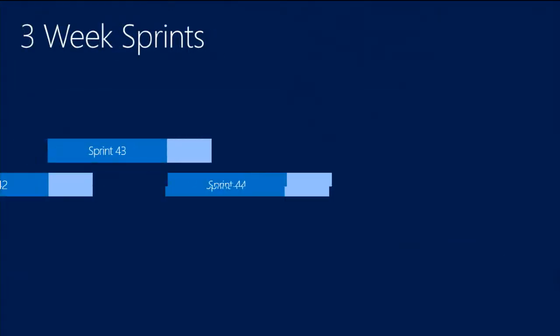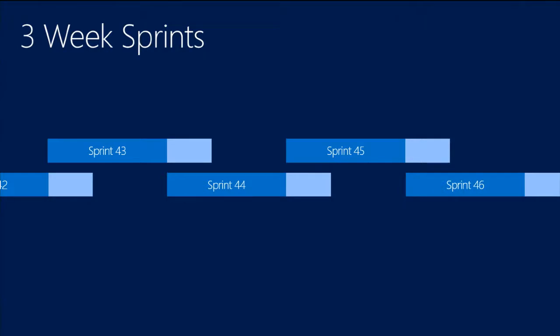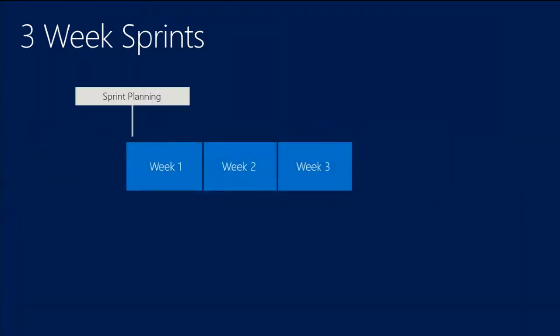So what does that sprint look like? These are some of the numbers. We're currently on sprint 49, so you can see that when I was putting these together was a while ago. A sprint looks like this. It looks like a traditional Scrum sprint. Teams do planning on the first day. They're done on the 3rd Friday. And there are 2 weekends in between.